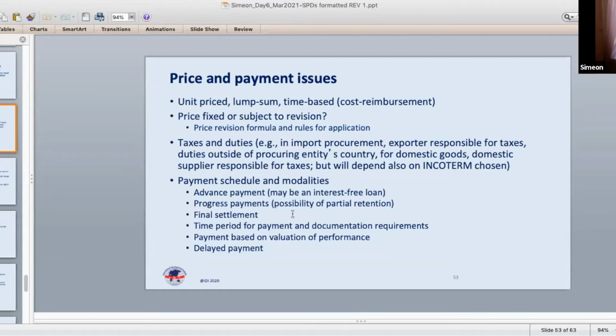I would say if the impact on the volume of work was not significant, then it probably is not worth negotiating about. Just pay it. But if there is a significant diminution or reduction in the amount of work that was performed because of the COVID restrictions, then I think there is a basis for a reduction of the price. So one has to look at the details of the situation and make the determination of what is the fair way to proceed, fair to both sides.